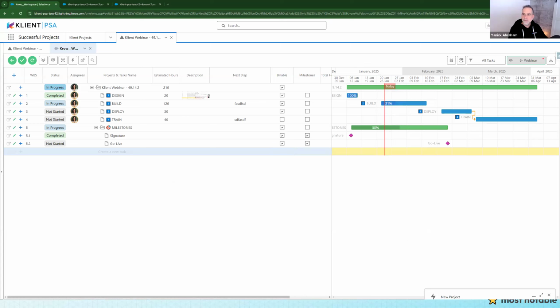And the last one, I don't think I'm going to have time to show it, but we have the QuickBooks grouping. So before, when you're generating an invoice and sending it to QuickBooks with our bridge that's included in the package, every line item would follow through. In Xero, we have another connector included where you can group, in Sage and Tech as well. You could group and define the grouping that should be sent to QuickBooks and not each individual line of time comments. So we've added those for QuickBooks as well. So if you don't want all the individual lines, but you just want one line per task or one line per project or one line per resource, this can now be sent to QuickBooks.